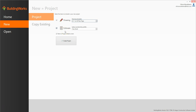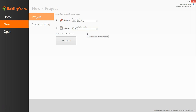All you need to do is select a labour productivity profile. The labour productivity profile sets the labour allowances for each of the tasks within your estimate. The extension and renovation labour productivity profiles generally allow more time for each task to be completed. You can customise the labour allowance for each type of labour from within your estimate. I'm going to select the new build labour productivity profile. Once you've done that, click create project.